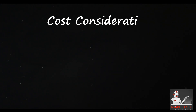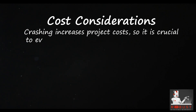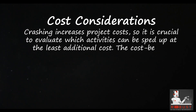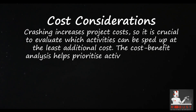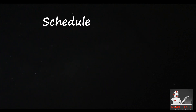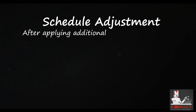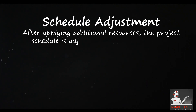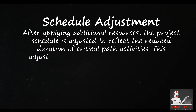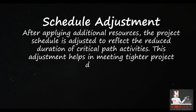Cost considerations: Crashing increases project costs, so it is crucial to evaluate which activities can be sped up at the least additional cost. A cost-benefit analysis helps prioritize activities for crashing. Schedule adjustment: After applying additional resources, the project schedule is adjusted to reflect the reduced duration of critical path activities, helping to meet tighter project deadlines.